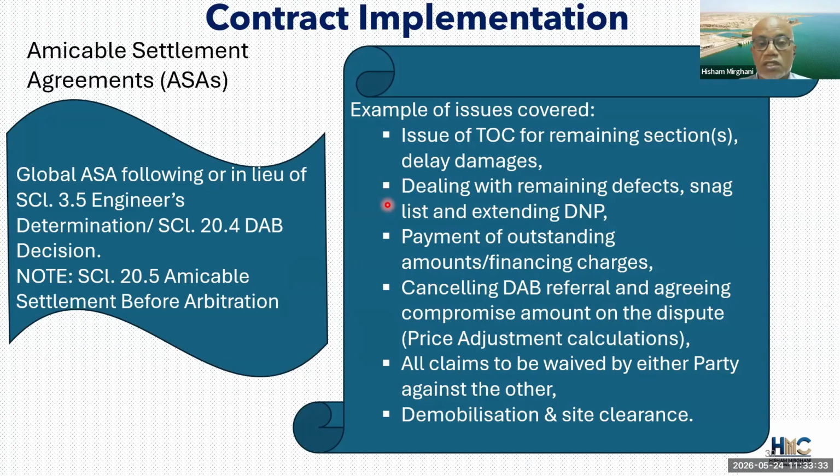These are some of the issues that you can see here that normally arise towards the end of the contract. And the approach of the employer here is to focus on the overall objectives of the employer. So the employer is not targeting to extract monies from the contractor. This was the policy of our management on these issues. What we are trying to achieve is completion of the project and operation of the project, and this is the benefit that we will extract from this project. So we were focused on handing over any sections that have not been handed over,